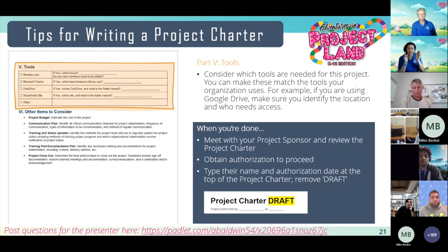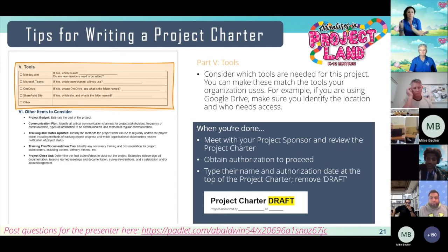Yeah, the charter is really meant to be a moment in time. So once your charter is authorized, you don't really go back and edit the charter. You'll want to keep track of your risks in either a risk register or you'll be communicating those risks using status reports to your project team and your project sponsor. So as new risks arise, you'll be using that. Yes, I saw Alex put in the chat a changelog. You could potentially use a changelog as well.